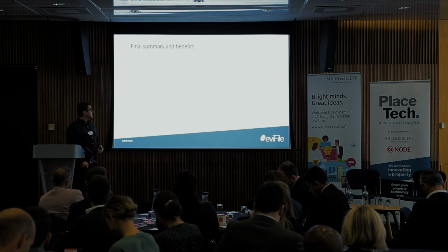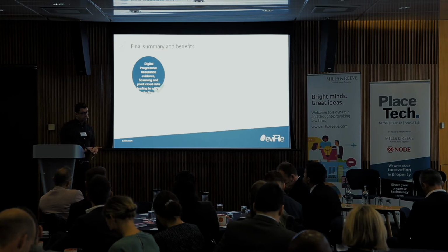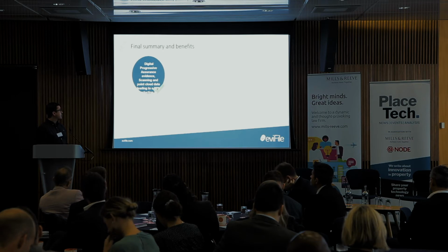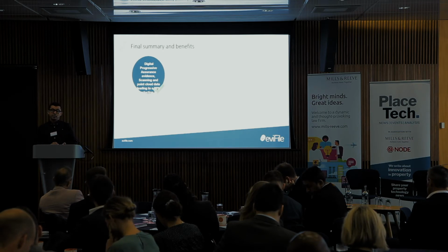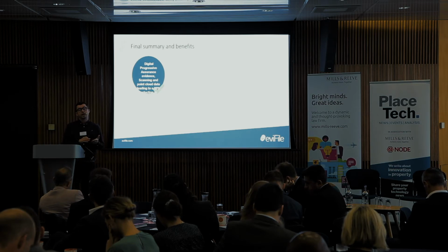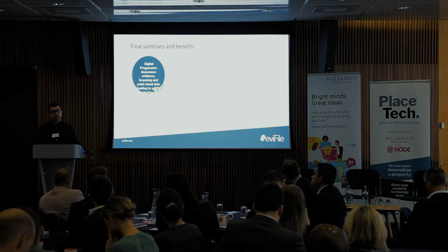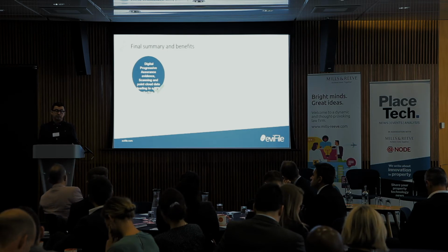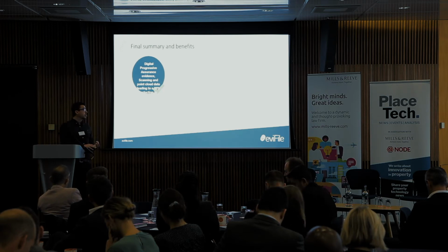And this generated some real benefits. Not something wrong with the formatting on the slides, but I'll take you through the key benefits. There was around a 25% reduction in rework. Because we were seeing the issues as they were happening, we were able to do something about that and actually course correct through the build, meaning that we didn't have disputes, we didn't have issues with things that were built incorrectly.